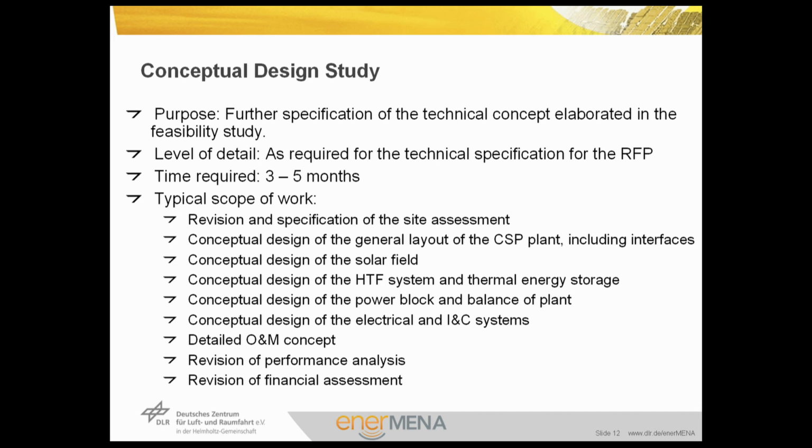In case of the IPP model, this study would be easily skipped because in this case, the level of details in the tendering document is normally less than in the EPC model. The reason for that, we have seen it earlier, is to give more flexibility to the developer bidder to optimize its plan by considering the most suitable EPC and operation and maintenance options.